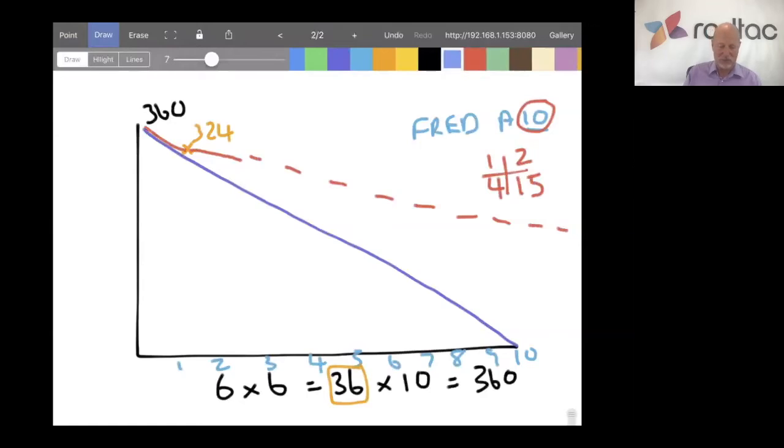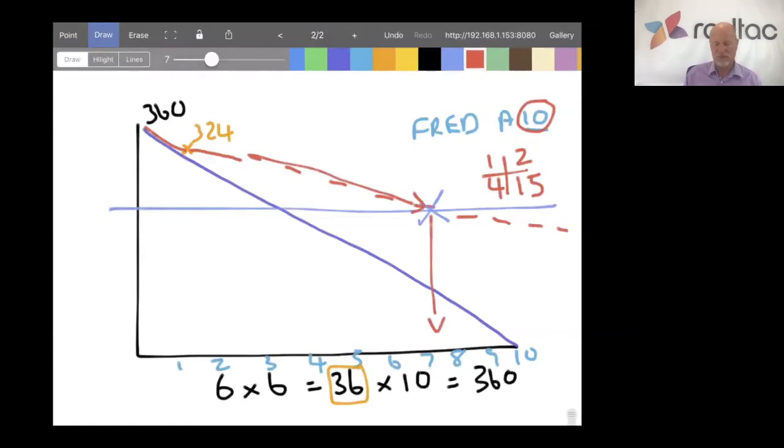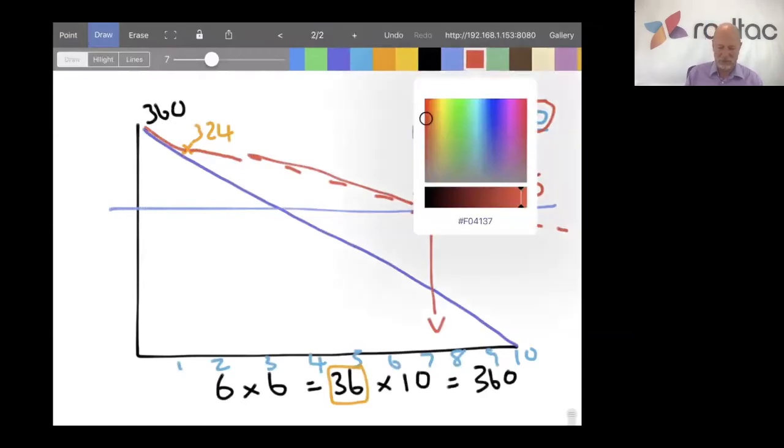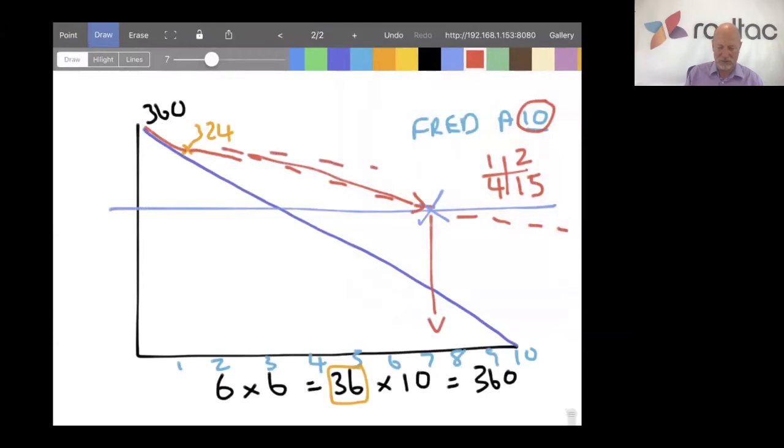Now, you can put a line on a burn down chart, and as long as your trend of delivery cuts the line of the sprint goal prior to the end of the sprint, that is showing you that you're likely to hit the sprint goal. However, if that line cut after the end of the sprint, that's suggesting you could not hit the sprint goal. And when I say suggesting to you, I mean suggesting to the development team, Scrum Master and Product Owner. So that would suggest we need to do something about this.